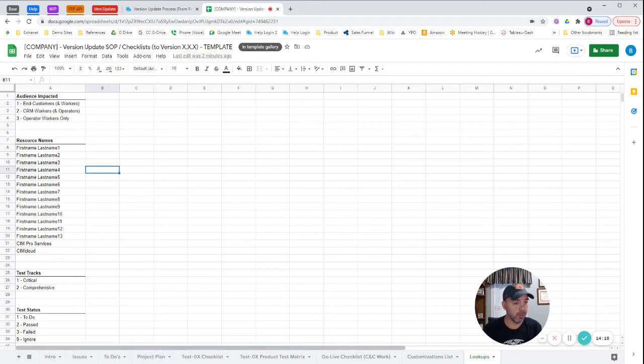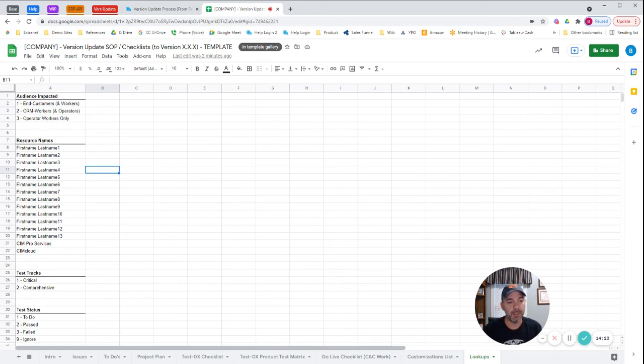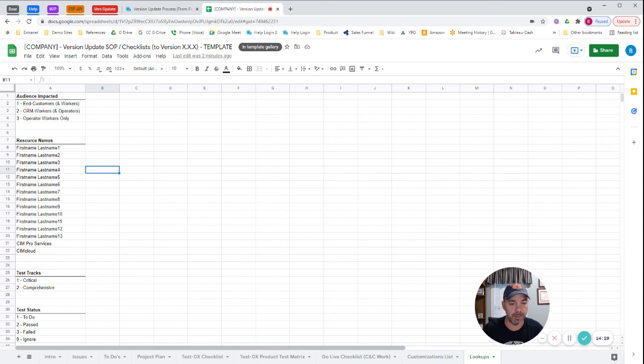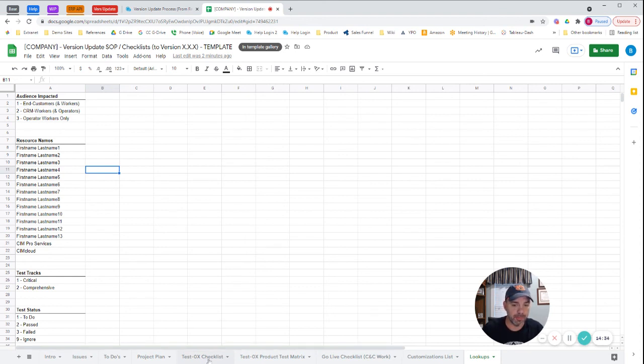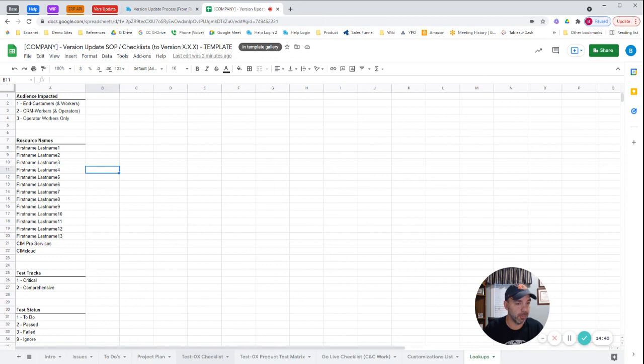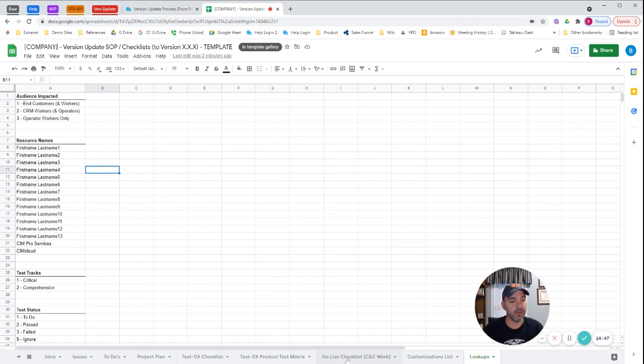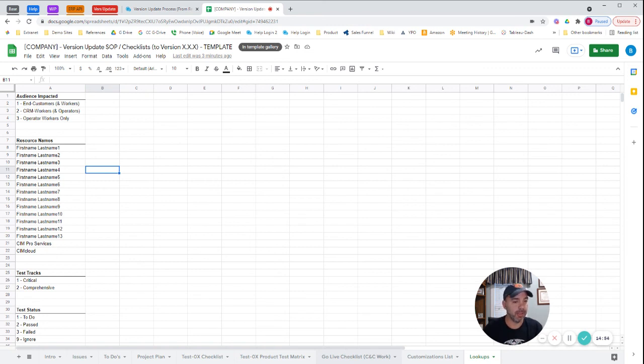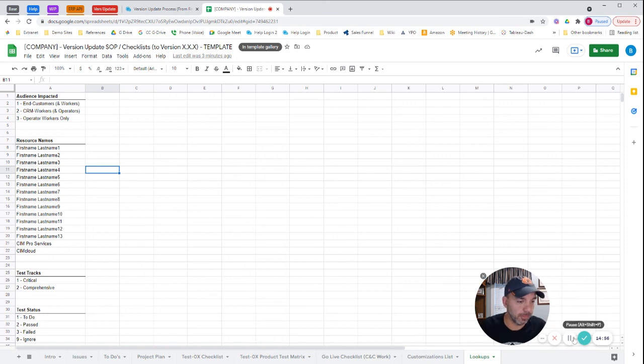We're focused here on version updates about upgrading the SimCloud core and making your customizations compatible. But it could also apply if you're using a project sandbox for a large project or a set of customizations that you're doing. These same principles apply. The key thing here is making sure you have a checklist that you're maturing over time. If you're making mistakes, it should go back into the checklist as items so you won't repeat them in the future. And you're using these two checklists for that. And then this checklist starts blank and on each version update, depending on what's in the version update and what you find during testing, going through the project plan, you're expanding that go live checklist. Hopefully this helps and let us know if we can do anything to help you.